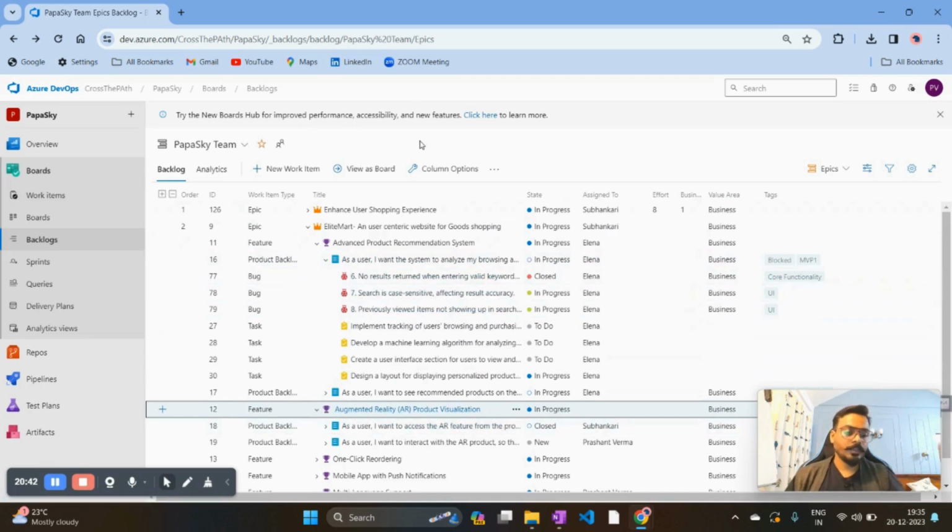So yeah, this is how we can create the user stories in the ADO and introduce the different layers in the ADO and assign those stories for the multiple teams. And from this backlog, then you can start assigning those stories to the corresponding sprints, which we can discuss in the next video. Yeah, so this is it for creating the product backlog items, followed by the epics, features, then the PBI, then the task in the video.